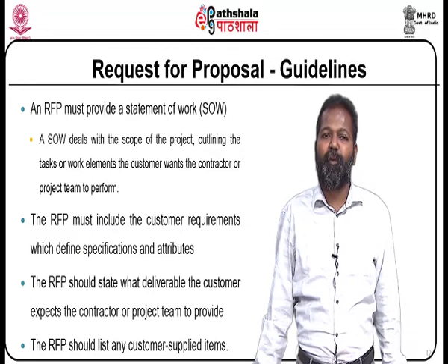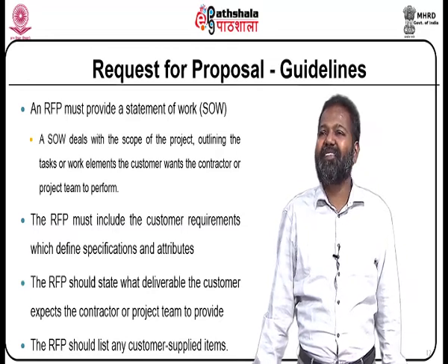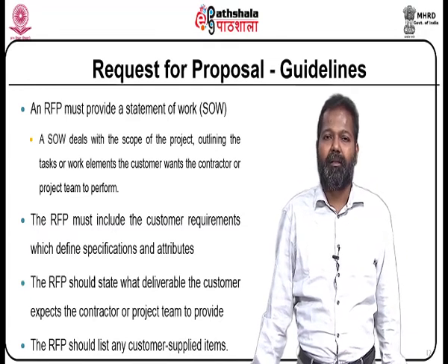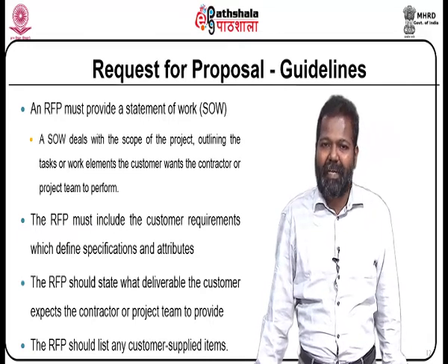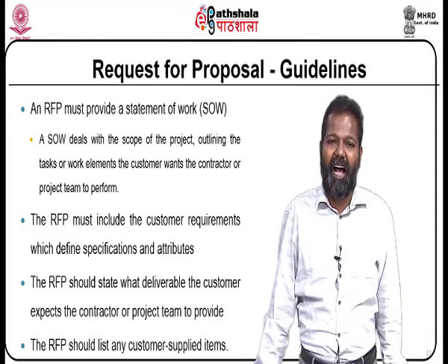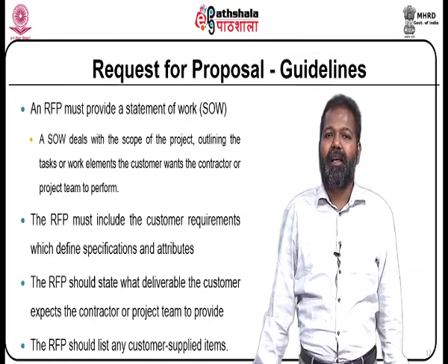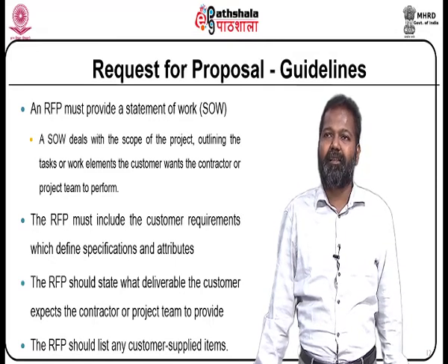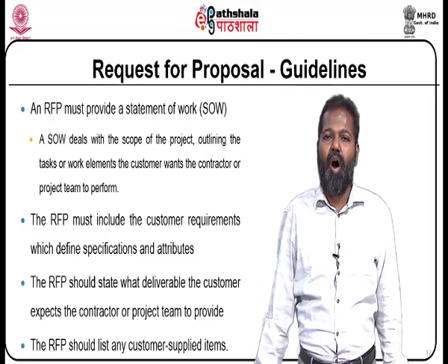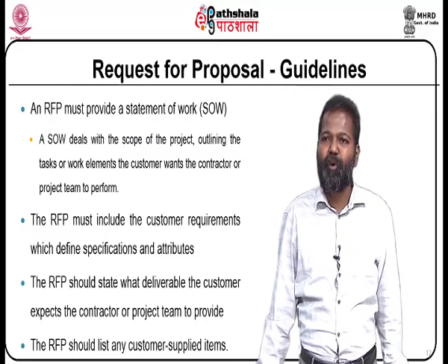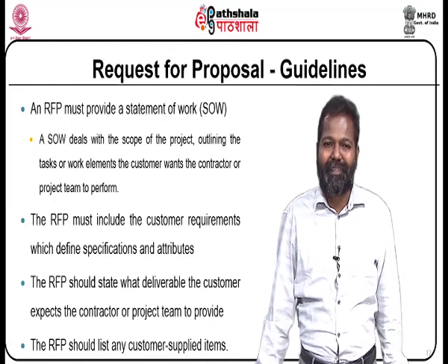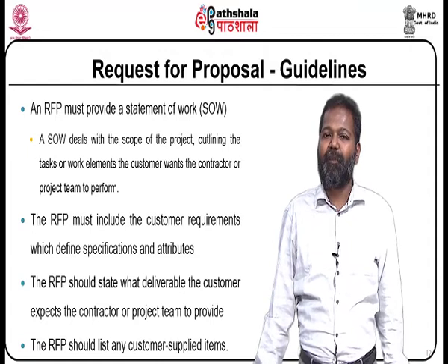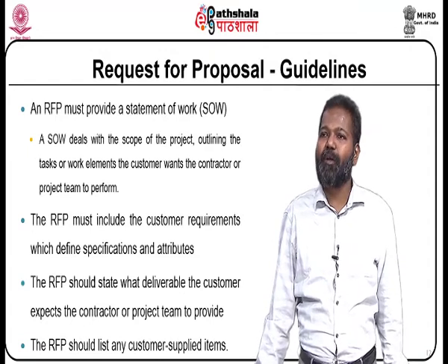A request for proposal must provide a statement of work. A statement of work deals with the scope of the project, outlining the tasks or work elements the customer wants the contractor or project team to perform. The request for proposal must include the customer requirements which define specifications and attributes.